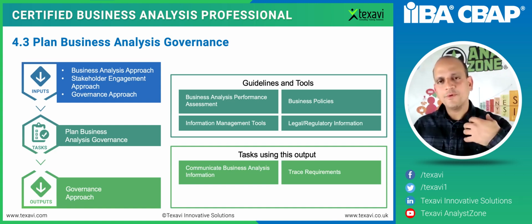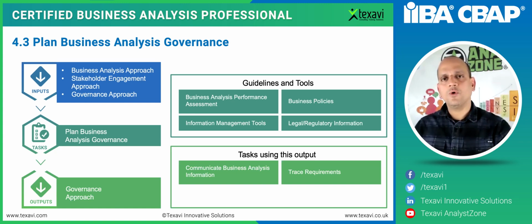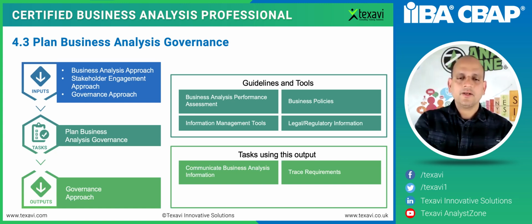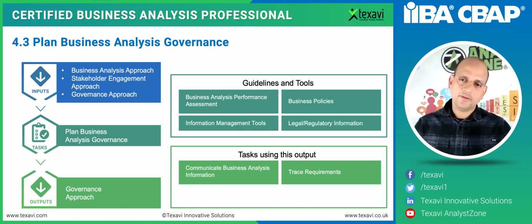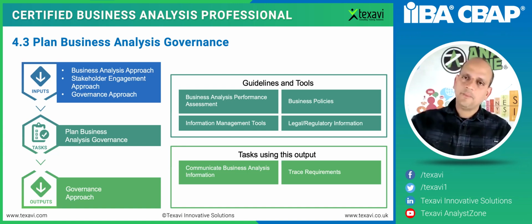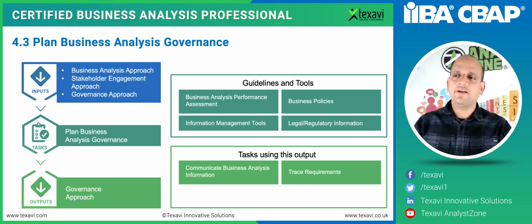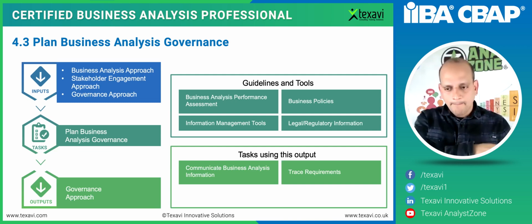And backward traceability is the opposite of it. So once you've got a piece of code or a test case, you trace that all the way from there to the architecture, and then from the architecture to the design, from there to the requirement, and finally to where it came through, whether it has come from an issue reported by a customer, or from a product owner's idea, or from a team member's suggestion in a sprint planning. All of these, so you're referring the test case all the way through, you're tracing it back to the requirement, or even before that, the source of the requirement. So that's called backward traceability.